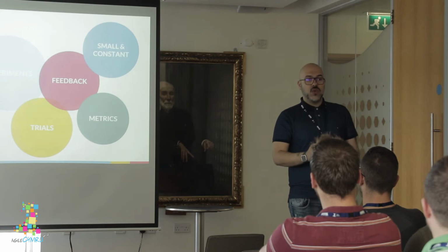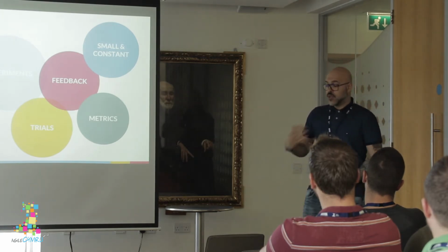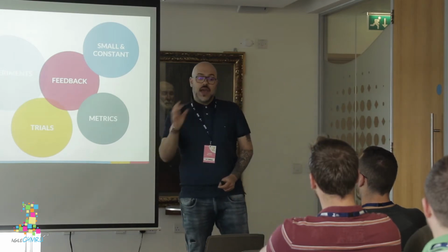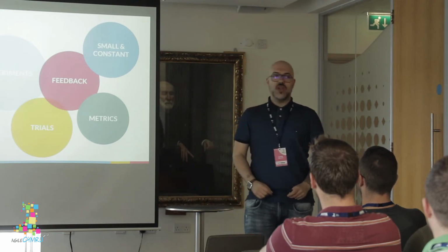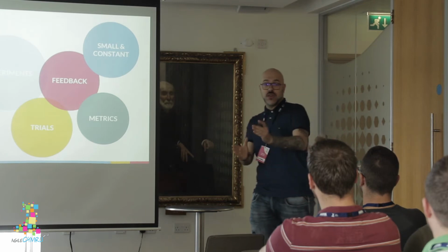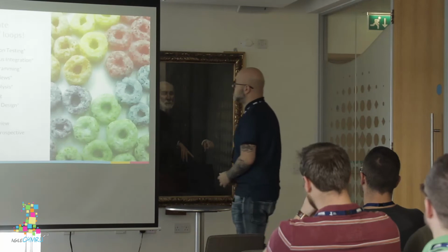Mainly because every week we have some gates with the product owner that was saying, yes, you're doing right, and go ahead in that direction. Or if we, let's say, waste 1 sprint, it was like 4 days of work. Not much. So we can immediately tweak our 4 days of work and change something else.